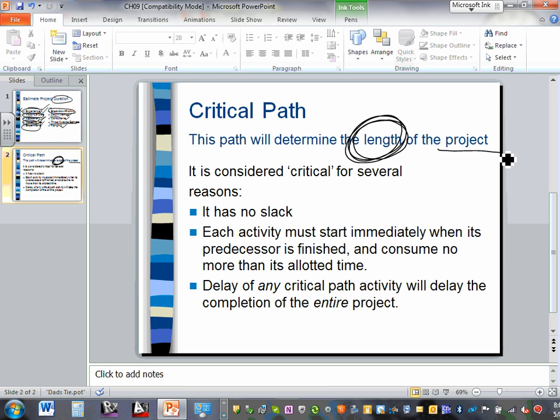You have multiple paths, guys. For example, you guys, 4 of you. If I said we're doing this project, and I said, Matt, you're doing power. Adam, you're doing lighting. Derek, you're doing low voltage. And Karen, you're putting the project together. So Karen is sitting right there, and each one of you needs 10 weeks to finish it, except Derek, to finish his low voltage, he needs 20 weeks. Now Derek becomes the critical path because you guys will finish in 10 weeks, you give it to Karen. Karen is waiting there. She can't finish her work until his 20 weeks finish. That becomes the critical path. It takes longer to do it.